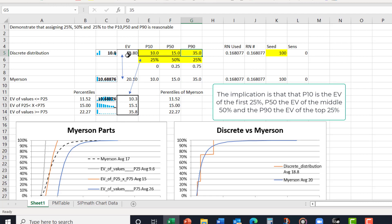Oh, I guess I should have pointed out here also, here's the expected value of the discrete distribution, and here's the expected value of the Myerson. And the percentiles, you can see, are the same.